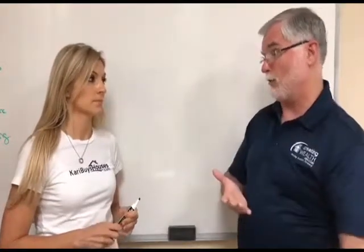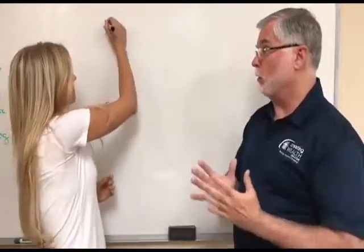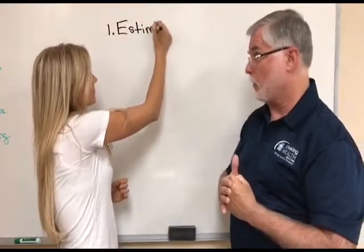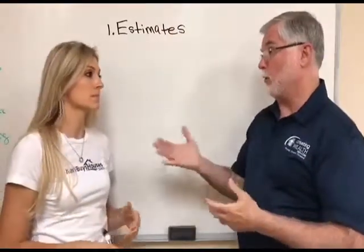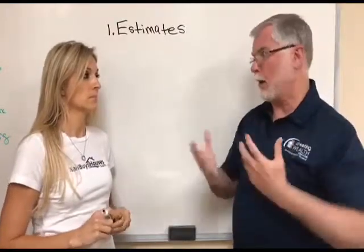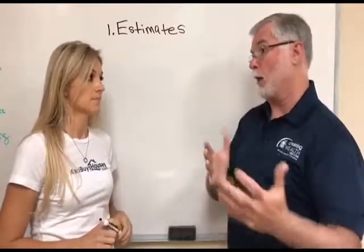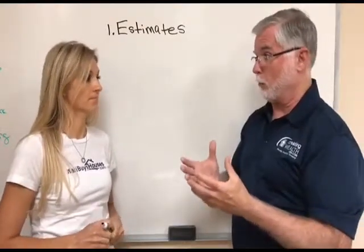So we always want to do some things in advance. Step 1 really is before closing, you should have all of your estimates nailed and your contractors lined up. And how do we do this? Well, we tend to do it during our inspection period many times. So we kind of pre-think out the situation. When I get my inspection, I know now what's wrong with the property, but when I make my buying offer, I should also have some estimates so I know I've budgeted well for my repairs.